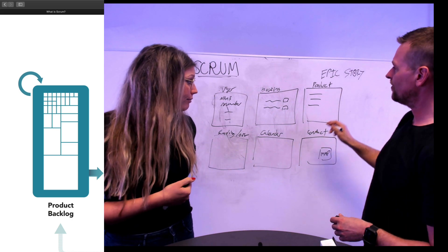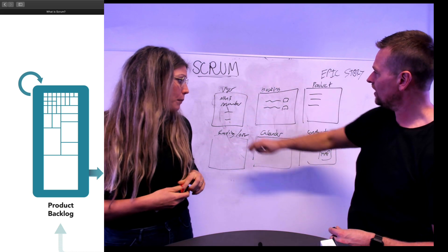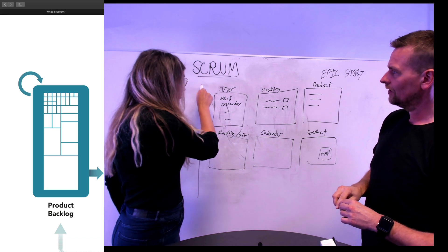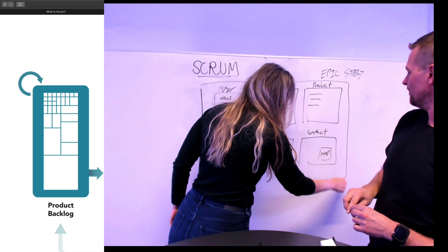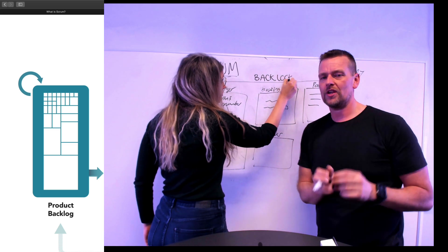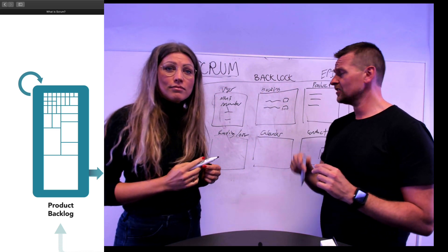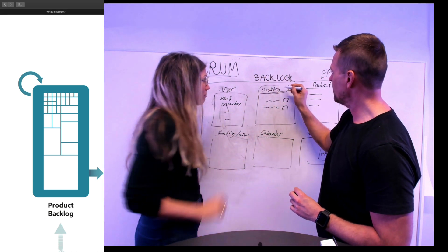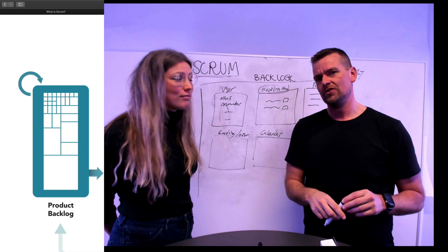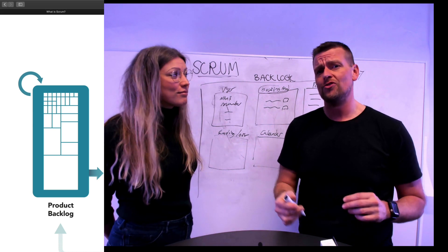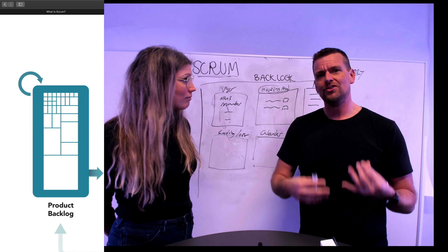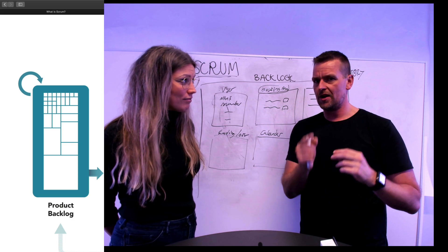So now we have a backlog with a lot of big stories — some bigger than others. That's our backlog. Normally what we'll do next is start breaking these down into stories. Epic stories first — for example, 'we need a booking area' — and then we break that down into actual user stories. That would be something like: 'As a user, I would like to be able to book a time.' Or: 'As an owner, I would like to create a product.' We'll dive into that later.